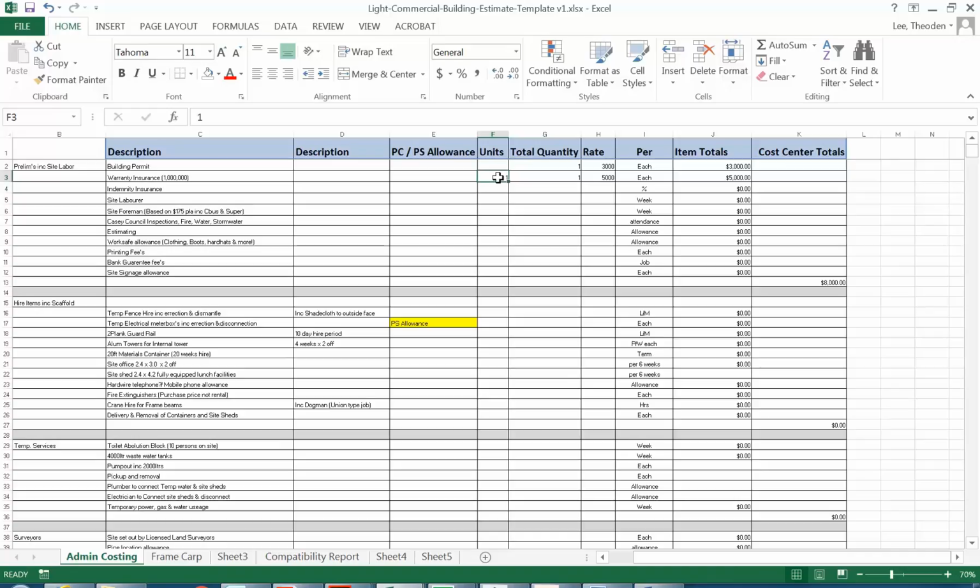So this is sort of like a schedule, like materials sort of. Is it a schedule? It's a spreadsheet, but it's more a table really. This is for you to know, so you can do a costing, so that you can give your client an estimate. And you would only give them a detailed costing like this if you're doing the project management for the project and acting as the builder. So you're providing them with a price to build it. Otherwise, you'll get this from a builder.